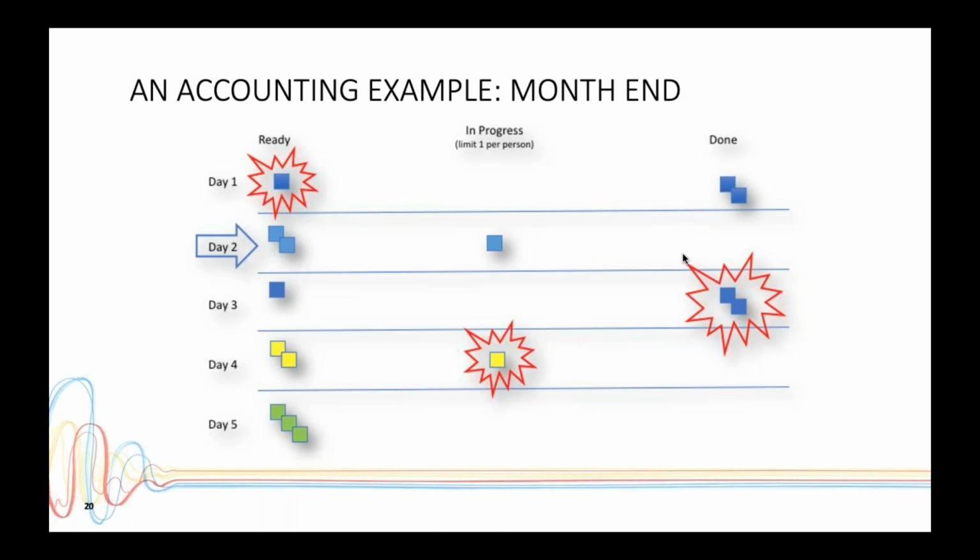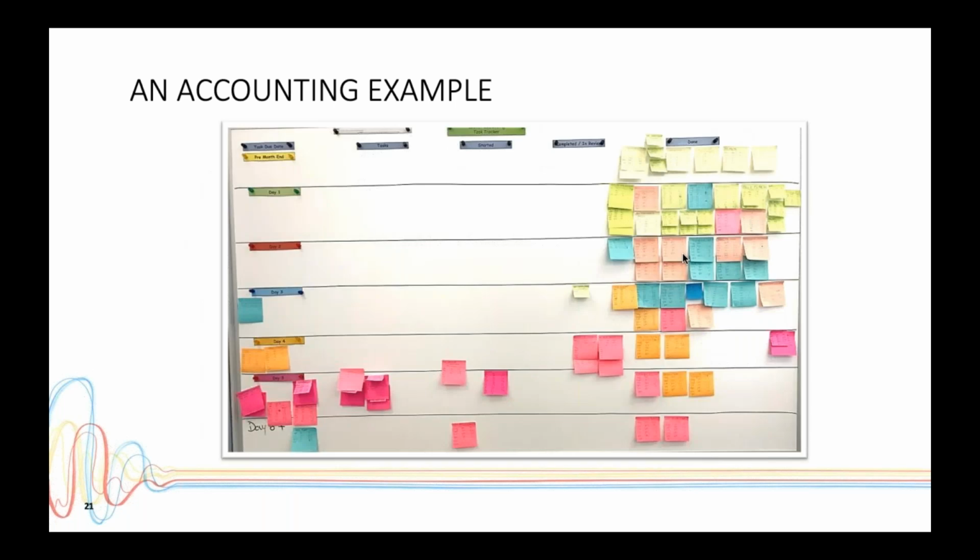but were rather doing it piecemeal here and there based on their own specializations. And they didn't have any view of how the work was flowing all together. And when there were dependencies, it meant there were delays, which just elongated the value stream. So what they did was they cross-trained people so they could do more tasks, and they had enough bench strength to be able to do all of day 1 on day 1 and all of day 2 on day 2 and so on. So it was actually by making the problems visible that they were able to achieve more continuity in their work.